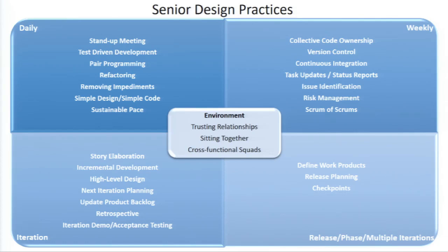Remember all those rooms and buildings we talked about that are going to be available? Because we solved that problem, Steve? Well, in that Brace Lab, let's say they meet from 6 to 10 on Wednesday nights. We're hoping that the squad lead will start out with a stand-up and have his or her whole team stand up and talk about what they accomplished last time they met, what they're going to accomplish this time they meet, and then if they have any impediments. They don't solve it in the stand-up, but they grab those impediments and put them in their back pocket so that they can remove those risks, right?